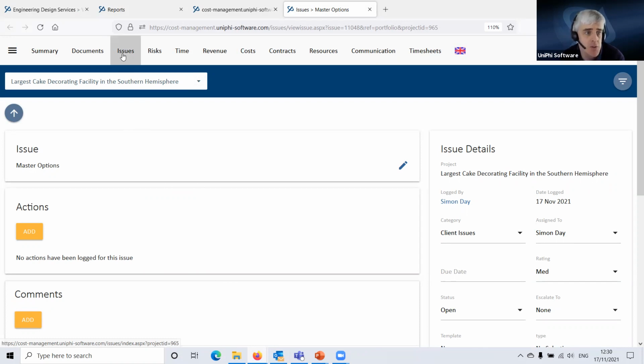And if you did our cost management training, we did a lot of stuff with variations and issues, and that you could use variations to track this from the beginning. So right when I saw that we're in meetings with extra options being logged, I could have logged this issue then and started tracking the correspondence around it and built up the evidence that this was a variation, to be able to include that in the document I then sent to say, this is what's happening. Because the old thing about getting variations approved is you've got to have lots of evidence to convince the client that that's the case. In this case here, we managed to do that. That's all good.